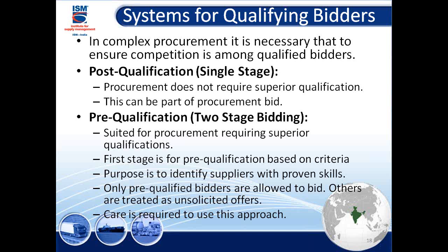Post-qualification is built into the same process. I've gone through the technical evaluation, I've gone through the price proposal, then I do the post-qualification. I say, guys, we can live with this one, this is great. But then there's the next one, the pre-qualification part. It's a two stage. That means first I have to pre-qualify.